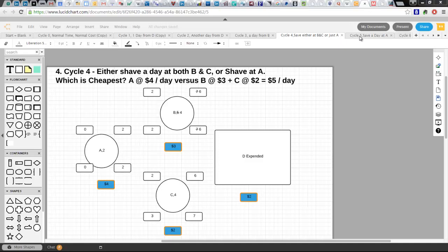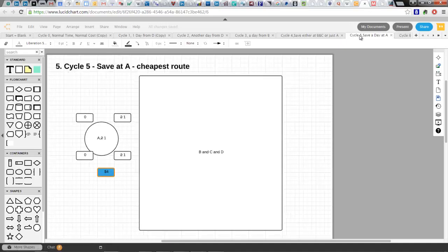Okay. So the next diagram to show there is ignoring the gory details underneath the cover here of what happens in the rest of the network. This just shows simply that we're buying the day from A, we reduce it from 2 days to one day, and we adjust all the areas that need to be adjusted on this.